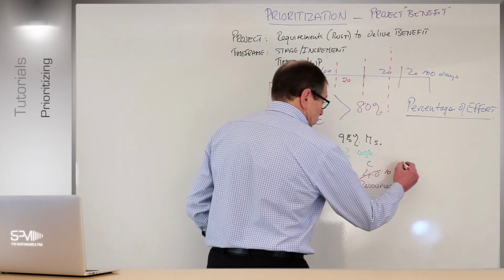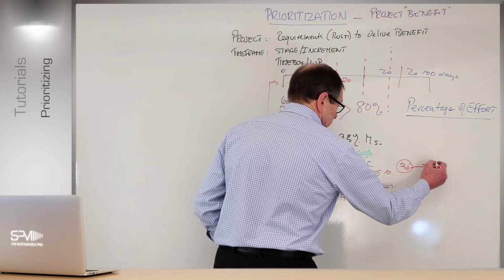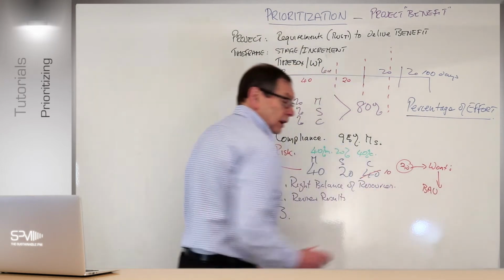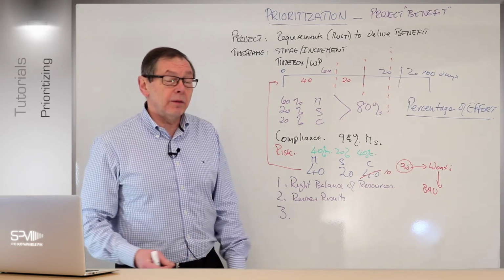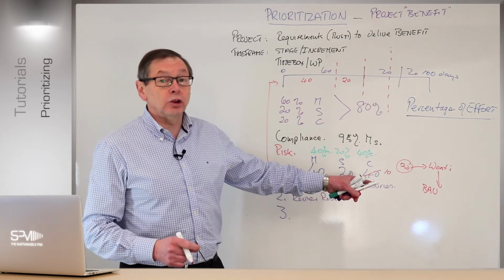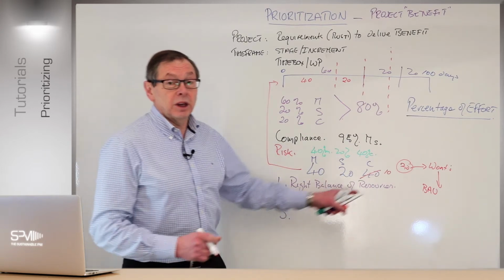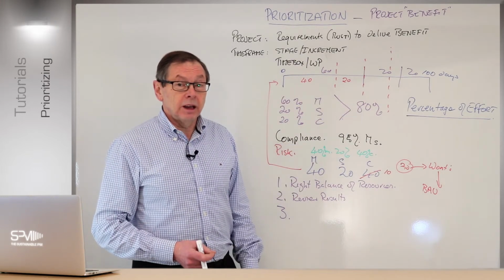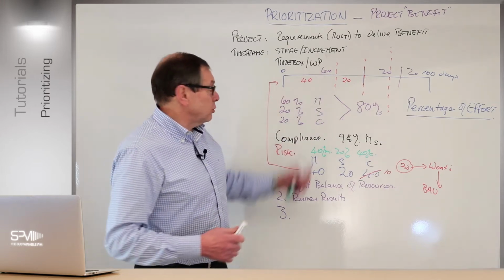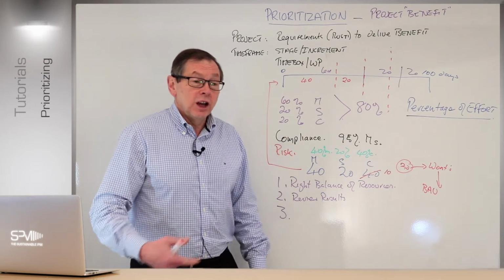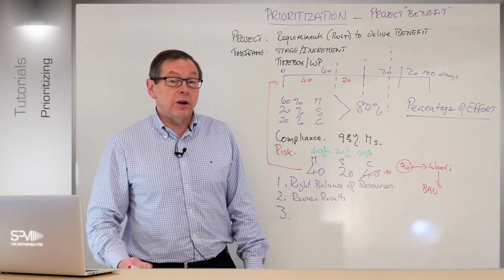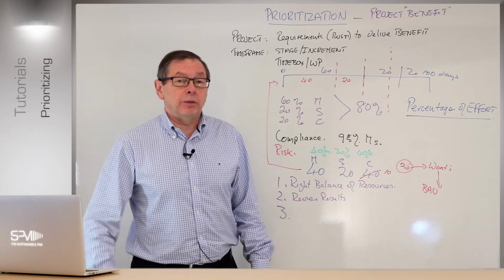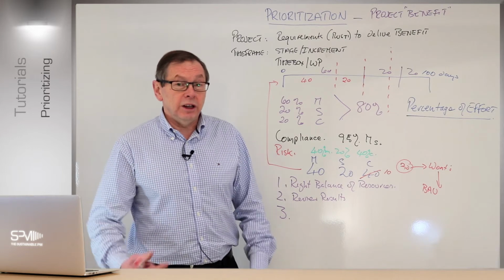Those 30 that we take out of here, that become won'ts, it's very simple. We can deliver them as BAU through operational change, through a Scrum or whatever other mechanism, because they won't impact on the solution, because the solution's here. So we can deliver all these little could-haves later, outside the project environment. And this is really taking prioritization to a much more pragmatic level, which we've done for many, many years in projects and programs to help us, especially on recovery ones, to get through and deliver a solution in a much more pragmatic and practical time frame for when the business needs it.